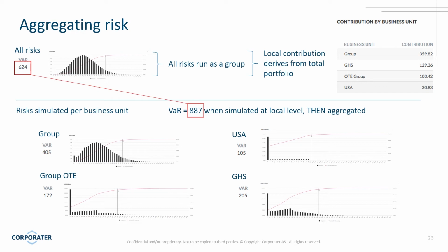I realize some companies use this approach, and there might be some valid reasons for doing this, but the calculations will always be higher than if you take the whole risk portfolio into the simulation. And the same thing would apply if you use risk categories. Like if you have your risks broken up by, I don't know, things that are financial, things that relate to environment, or just the different categorizations or taxonomies for the risks. The best way to do it again is to run these simulations as a large group, and then to break them up either by categories or business units and so on.